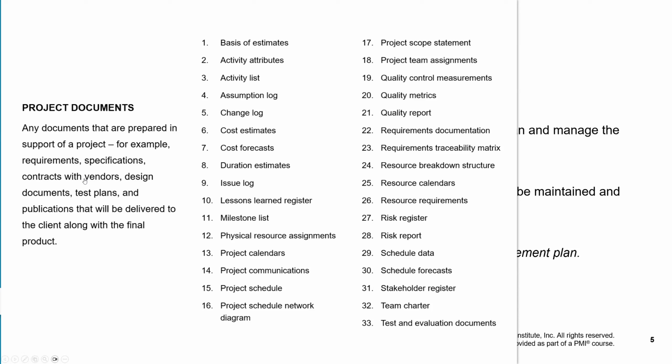Exactly, exactly. As far as the quality is concerned, we do consider the quality as one of the objectives, as you can call it the fourth objective, but quality doesn't have a baseline. Why? Because quality is dependent on the scope, schedule, and cost. And therefore, if I am fulfilling the scope, time, and cost, quality comes automatically with it, right? So there is no need to have a separate baseline for quality because quality is kind of a standard, kind of a policy, which we will anyways be following. So basically, when we establish the scope, we have included that portion of quality within the scope, within the schedule, within the cost, so that is included, right?